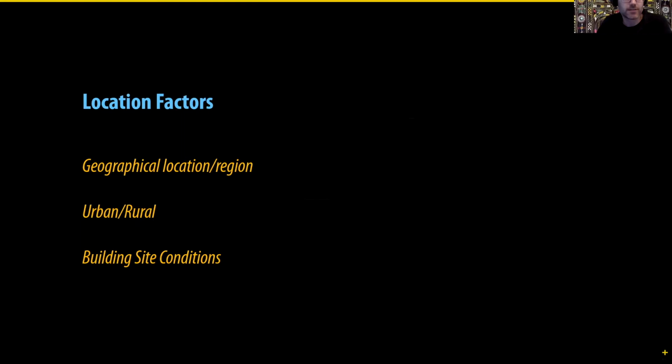We get 67 days of free, ice-free shipping, and the materials come from Montreal on one ship. And you can bet that there's about a 250% location factor added on to the construction costs of the Nova Scotia construction for the same building.